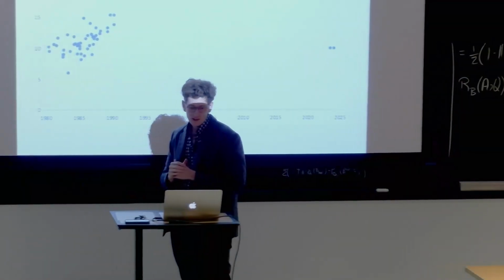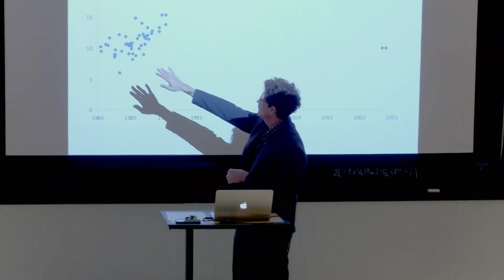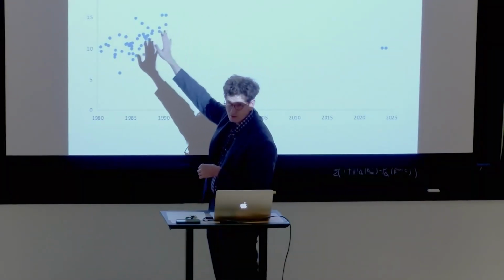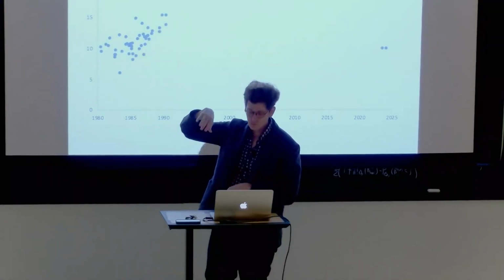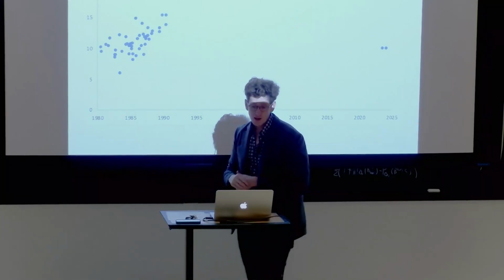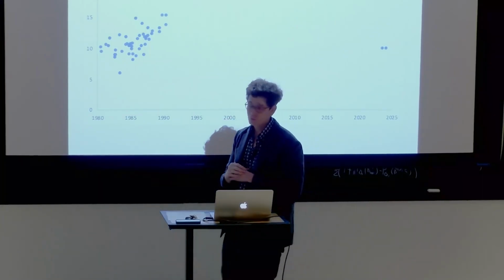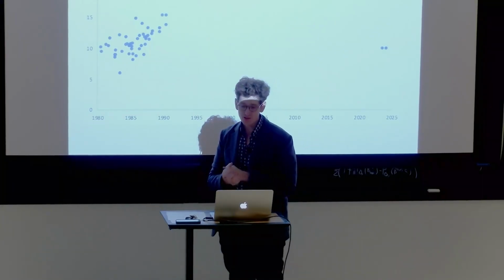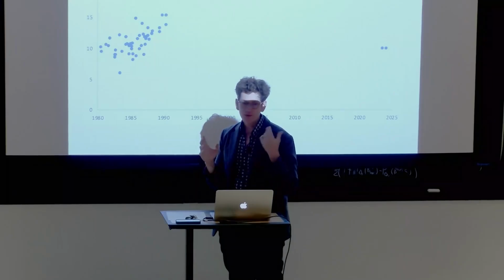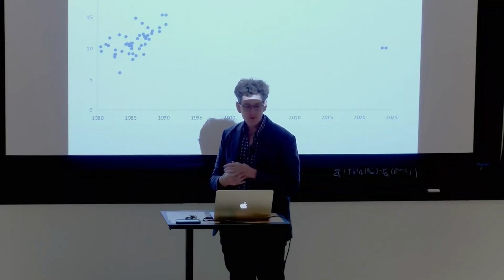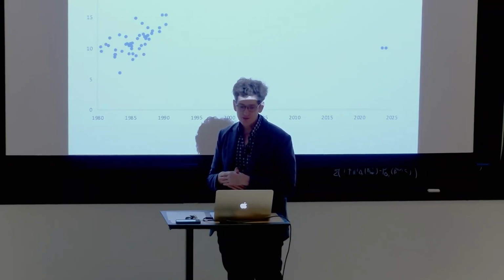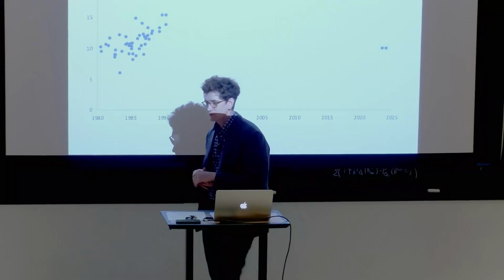What you see is that it took longer and longer to build our reactors. This explains some cost increase, but not in the overnight cost. Most of these reactors were supposed to take about half the time that they actually took. Those estimates were bad, and the reason they were bad is because of safety-related considerations.